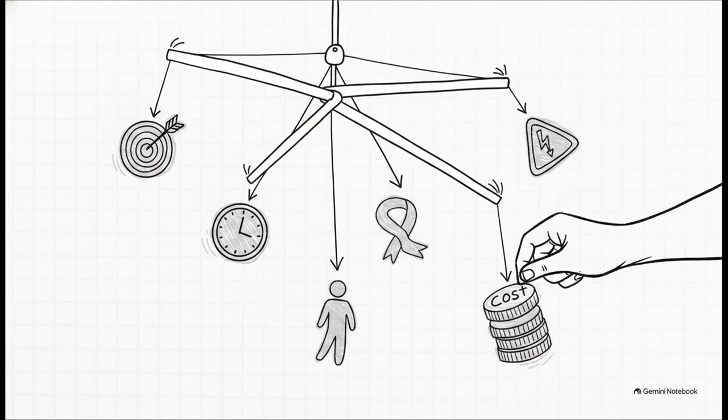Are there scope additions? Is this going to cause a schedule delay? What about the budget? Does it mess with our quality standards? Are we going to have to pull staff off other critical tasks? And crucially, does it introduce brand new risks? You have to look at the whole picture.